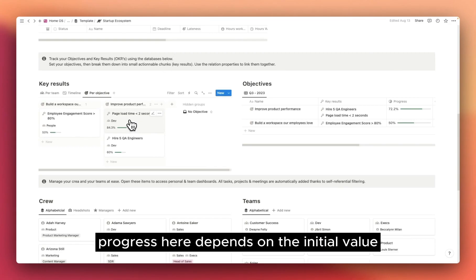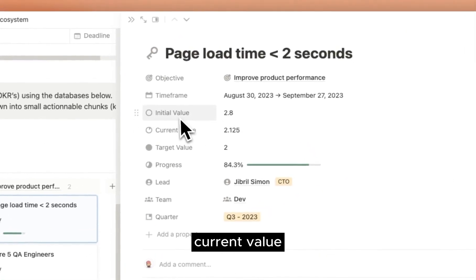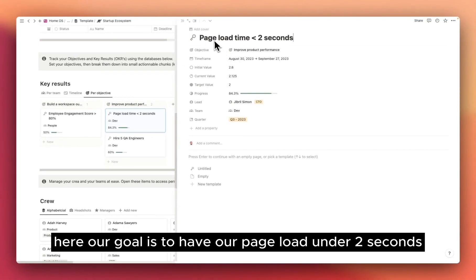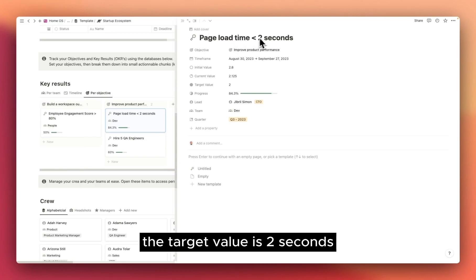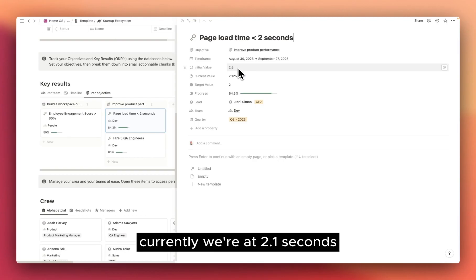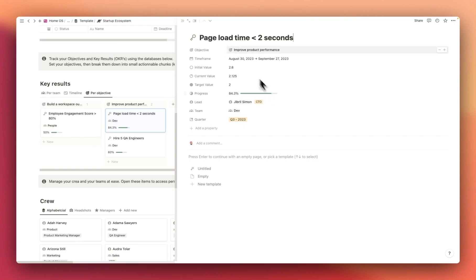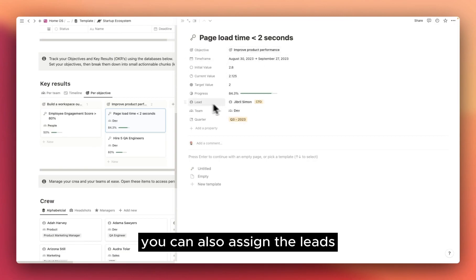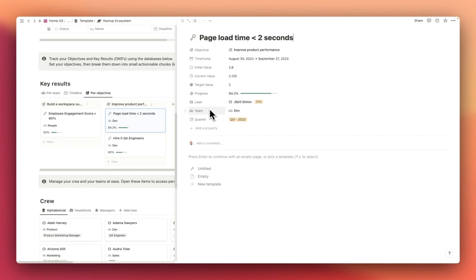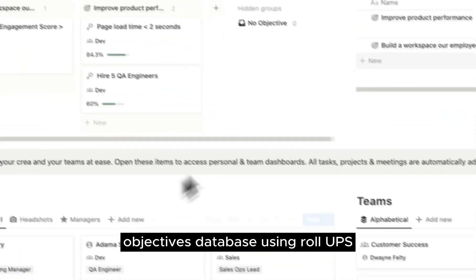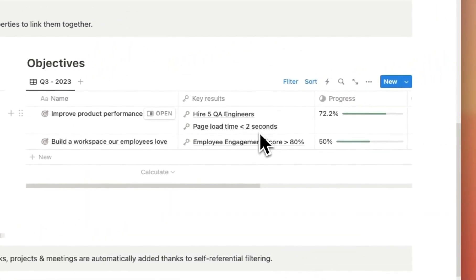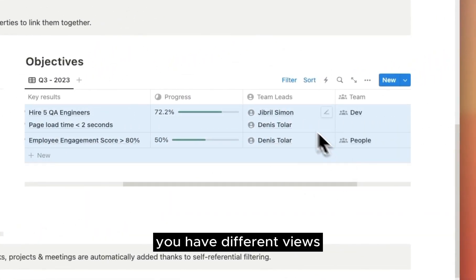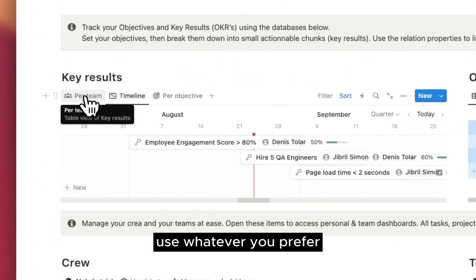Key results progress here depends on the initial value, current value, and target value. Here our goal is to have our page load under 2 seconds. The target value is 2 seconds, and we were initially at 2.8 seconds. Currently, we're at 2.1 seconds. So our progress so far is 84%. In the key results, you can also assign the leads, teams, and quarters. All of this data will be retrieved in the objectives database using rollups. For key results, you have different views like per team or timeline. Use whatever you prefer.